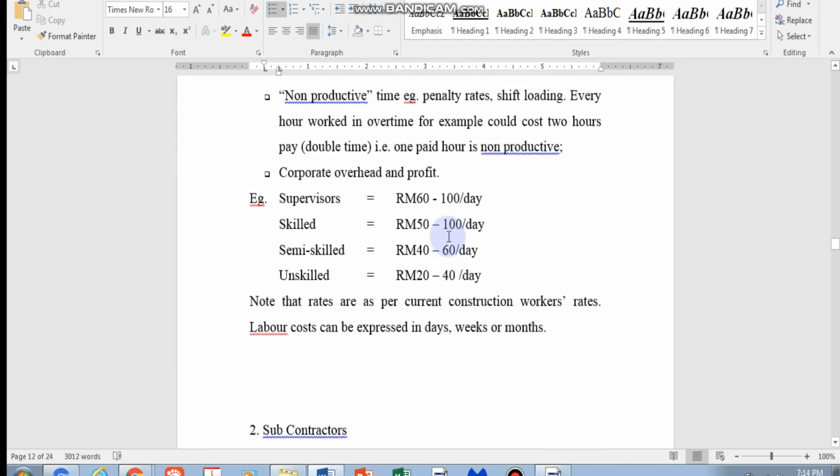And then also management, if you talk about supervision teams and above, it's the same thing. There will be meal allowances, phone allowances, hostel allowances, site allowances, car allowances, petrol allowances, all of which are part and parcel of the unit that you are looking at. So don't just say you're paying $2,000 for the engineer, because actually all these other expenses add up and you're actually paying $3,000 a month. So you have to be very careful, and any other claims that come in are all part and parcel of the cost. You must calculate your component of cost or the rate very carefully.